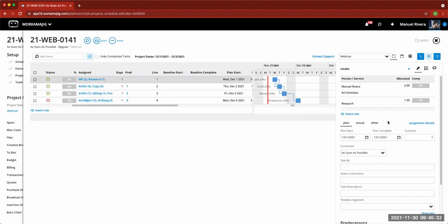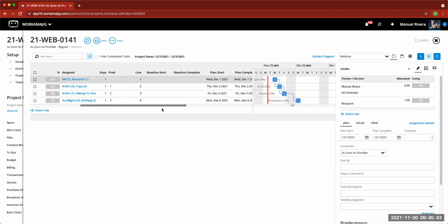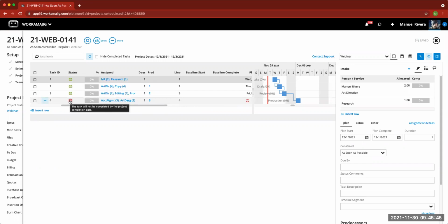So in that case of the next steps to get to answer those questions, the system is also going to ask you... well, just to finish my thought here with this last one. So you have a choice, right, with this last task. Do I tell the client that it's going to be late and that we're not going to meet the December 3rd deadline that I've set as a flag? Do I tell my team to rush and maybe we crunch one of these milestones into a similar day as another? You can do that. And we'll talk about those options here in a moment. But however you do it, right, that's how you then adapt.